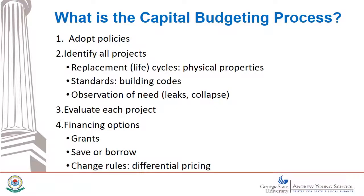What is the capital budgeting process? It can be a quick one or a more elaborate process. If your organization has few, if any, large purchases or construction needs, then there's no need to do a capital budget. First, it helps to have a clear rule on what is a capital project. For example, a capital project is one that has a useful life of two or more years and costs more than the average salary of your workers. This type of definition places the capital asset outside of what would normally be consumed in one budget year, and sets a relatively high price tag as conveyed by how costly it is to add a new staff member in a tight budget environment.